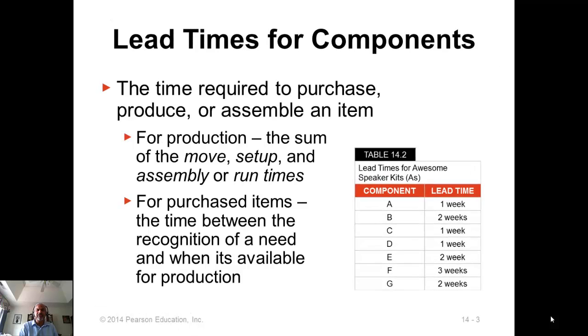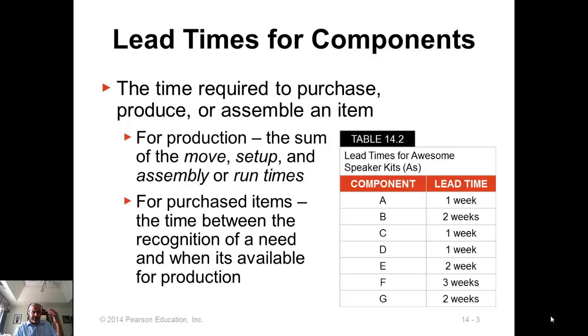So the lead time, if it is a vendor order, is the time between you placing the order and the order coming in, and if it is a production order, it is the sum of all the wait time and cycle time and production time and everything included. So the time between you placing the order with the shop floor and the time when the order is completed and the stock is made available.